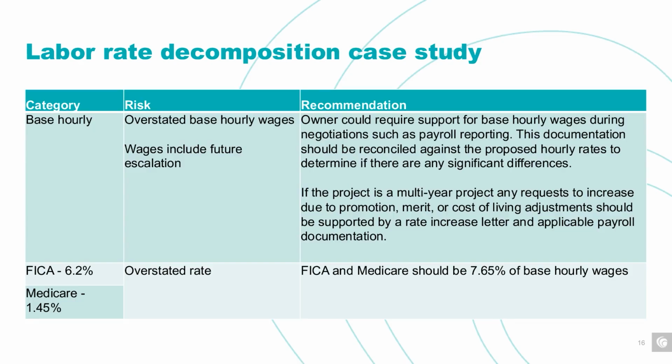So first and foremost, we've got base hourly wages. As I talked about, we want to see actual support from the contractor to ensure that these rates aren't overstated. We're looking for things like, if it's a multi-year project, we want to actually see the method by which they potentially will escalate these rates year over year. Looking for whether or not they've averaged out previous or upcoming years' escalation into the rate to ensure that we're actually paying actual cost.